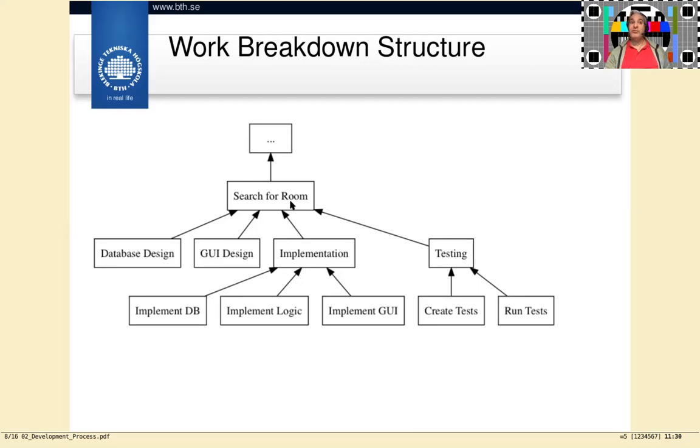At which point you need to start prioritizing. What do I have to do first? What can I skip altogether, and so on. But then you're doing that with much more well-informed material, because you've started from the bottom. You know that this is how long this is going to take. I can maybe take a few shortcuts here and there, but overall this is how long this task is going to take. Doesn't really matter how much they're paying me to do it. This is how long it'll take. So always work from the bottom and work your way upwards.